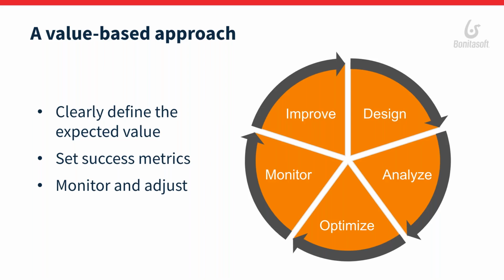Sorry, one of our banking customers in Switzerland has implemented exactly that. They set success metrics at the beginning of the first loop, and regularly at the end of each loop they measured them. So they were monitoring the improvement regularly, and then adapting the process and their design. That's exactly what you said. And then they were keeping an eye on what they were doing and not forgetting where they wanted to go. And that's something we are going to see just after.